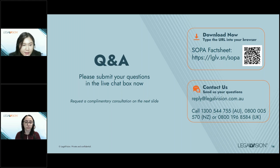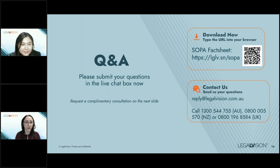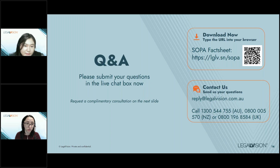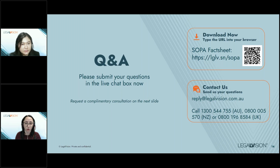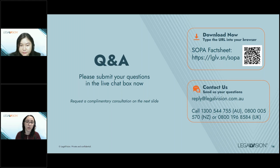Question: How do you determine the interest rate and when to charge it? The interest rate may be determined by the construction contract if you have a written one. Otherwise, the Act prescribes an amount payable under the Civil Procedure Act — currently around 10.10%. You can charge this on the unpaid amount of a progress payment from the moment it becomes due and payable.